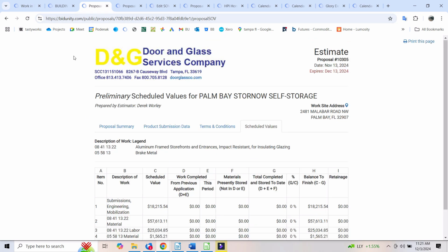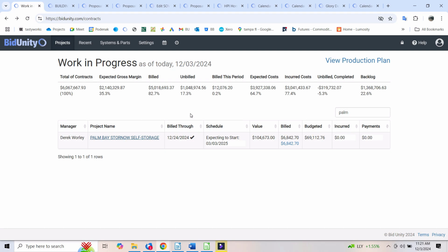And that's a high level and fairly complete explanation of the schedule of values, how it's used, and the progress billing. You want to definitely be thoughtful to structure the schedule of values in a way that adequately, fairly represents the cash costs and amounts earned. Everything should be in proportion to how we incur costs, or if not, then it should be slightly tilted toward Doran class's benefit.